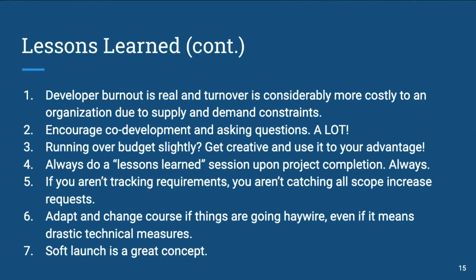Running over budget slightly, get creative with your clients' PMs and use it to your advantage, don't panic. You ask them to give you online reviews, ask them for Google and Yelp, try to mitigate some of those things. You'd be amazed what some people will do if you say you'll write off a few hours. Always do a lessons learned session at the end of your project. Always, always. You are not going to be the best you can be as an organization if you are not.